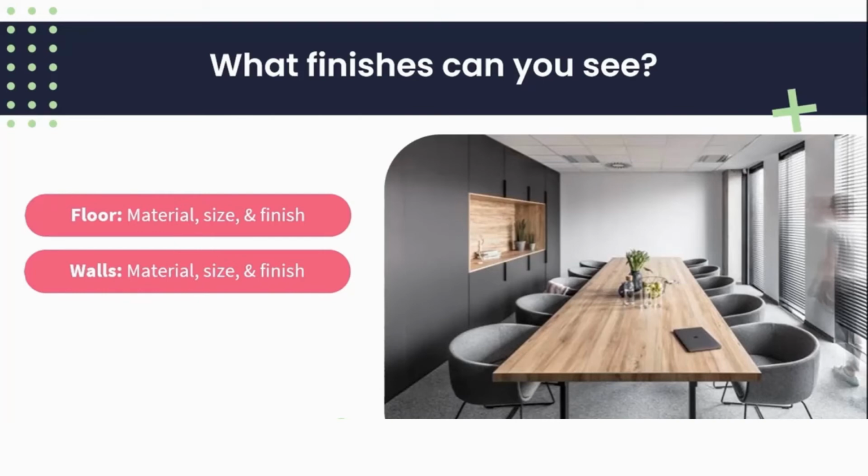But for the purposes of this exercise, I'm going to give you an idea of what paint color I've got on my walls, which is pretty similar to the one in the picture. So the one on my wall, the material is a paint finish. The size, again, we're going to specify the size of the wall, so how many square meters we're looking at. And then the finish. So in my case, it's a Plascon Mandarin Tusk, and then I'm going to specify the code, so a 60cc code, and then any other detail relating to that wall. So it's a wash and wear.